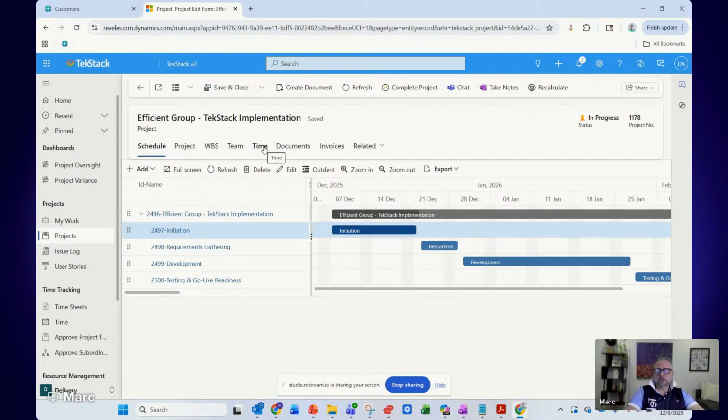What I'll do is there's a bunch of ways to enter time on a project. We'll go into that another time, but we could do timesheets where you have, let's say, 40 hours of expectation in any given week. Anywhere between 32 and 40 hours is typical. 32 hours would be an 80% utilization target for a given week. And you can see as I enter time against that timesheet, it'll say you've entered 8 hours against your 32-hour target this week, and it'll just tally all that kind of stuff. And it'll also basically pre-fill your timesheet based on all the work that you've been assigned. So it makes it super easy to do time entry.